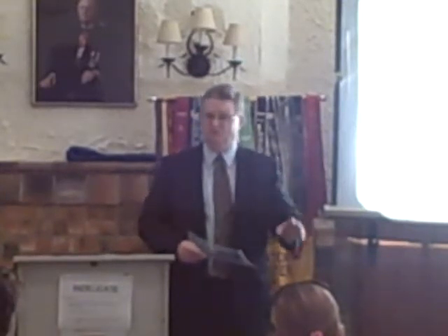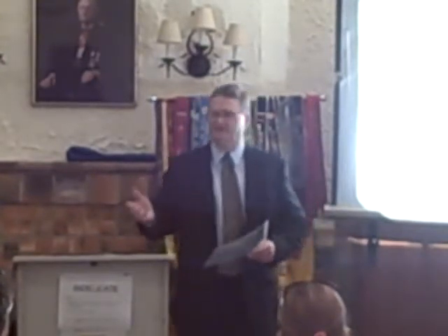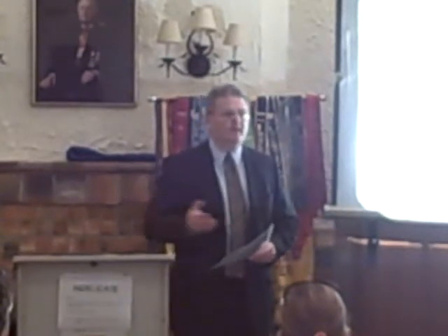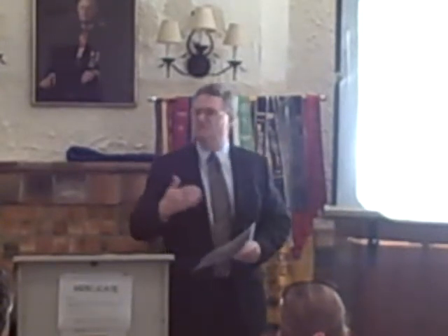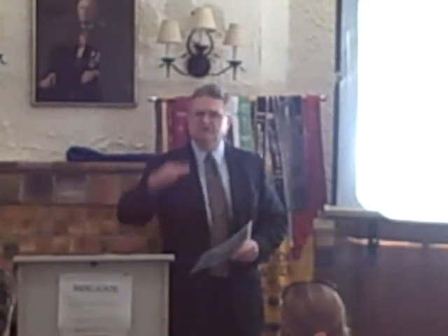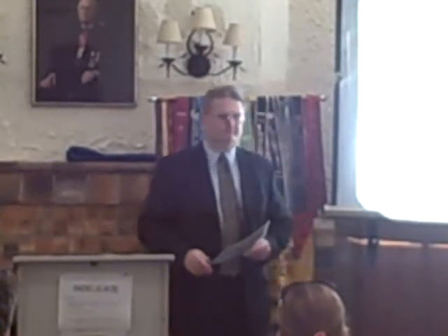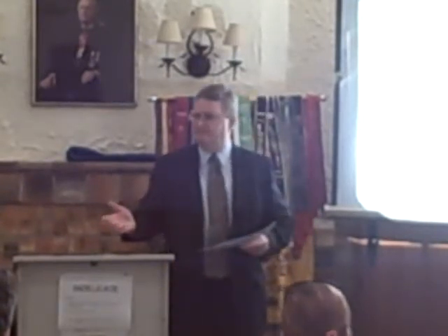Next step, take preventive action. It's not planning, it's taking. Do the things. Once you're done on the preventive side, look at the contingent side. If this problem happens, assume it will, what actions will we take to reduce the impact, the severity of the problem? Those are the basic steps in doing potential problem analysis. Let me give you an example.